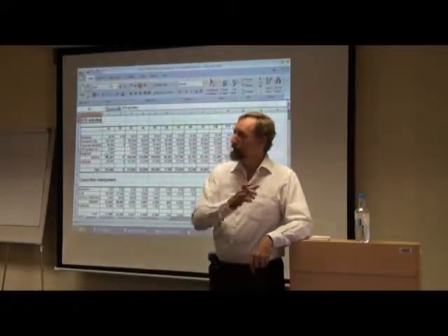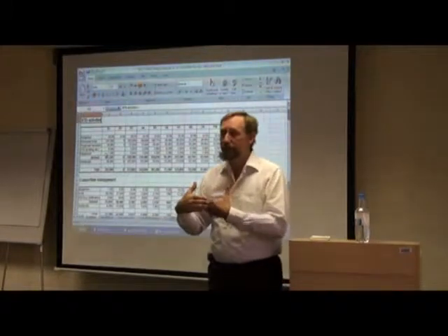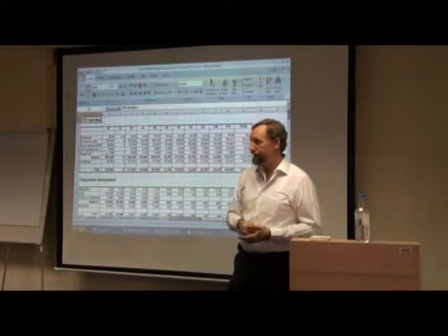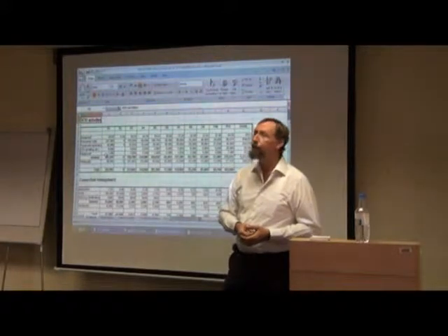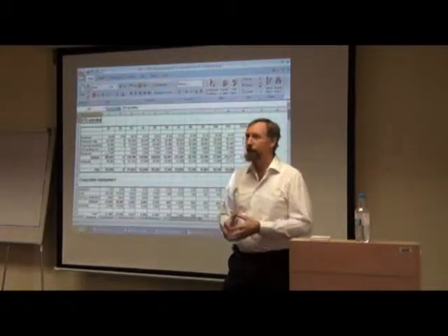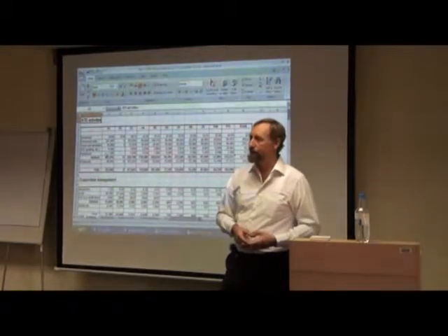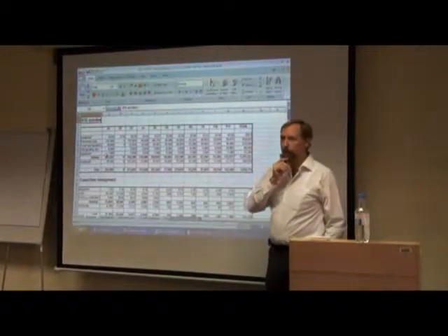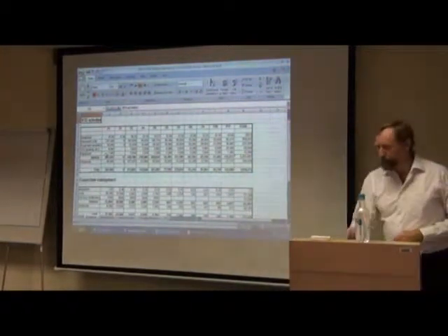While in FP6 and other funding programs, it's very rigid and you cannot shift between categories. So this is one of the main benefits of FP7 I can find. It's far more flexible in this way than other funding agencies I can see. So I hope this is roughly understandable. Now going back to the presentation.